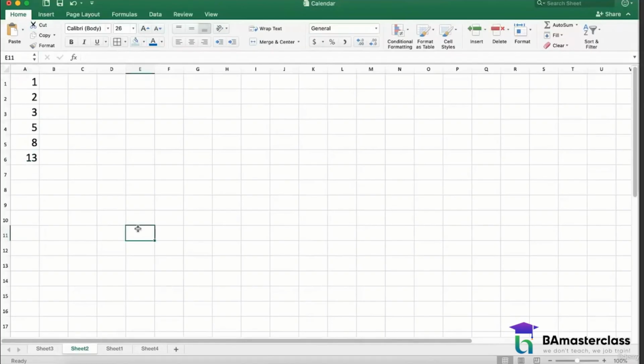So story points are given using Fibonacci sequence. And then you want to say story points range from 1 to 13. So you can just write down the entire range. Story point range 1, 2, 3, 5, 8, 13. This is the range of story points. These are the different numbers that you can use as story points, with one being lowest effort and 13 being the highest effort.